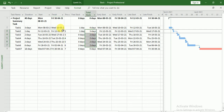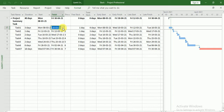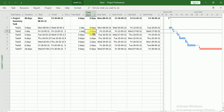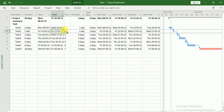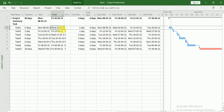But if I delay this task by only one day, then my free slack will still remain for three days. So if you look here, the finish date is Wednesday 10th of March and the late finish is 16th of March. If I add four days to this finish date, I get my late finish date. This means I can delay this task up to four days so that my project finish date should not be hampered.